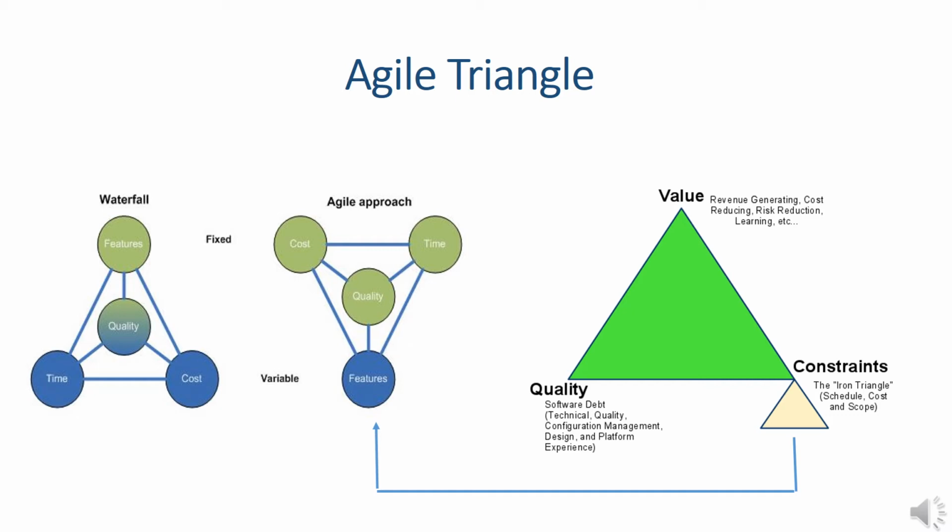And that brings us to one more statement: in Agile, if you look at the contract, the contracts are basically based on a few iterative cycles. The customer can sign up a contract for, say, 10 iterative cycles and then renew the contract if at all he needs more features, as a version kind of release for the product.